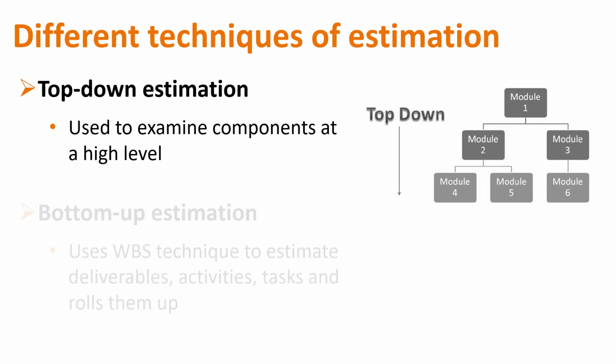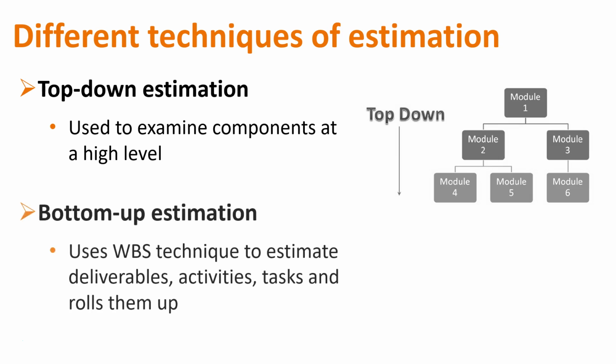That's top down. Bottom up is a lot more accurate. Bottom up is when we say, okay, these are the features we need to do. And instead of estimating up here and then breaking them down and allocating time, we start with the feature, we figure out what does that mean, we break it down into the components, including things like further analysis for requirements and development and test and development correction and UAT, and we figure out all of that stuff.